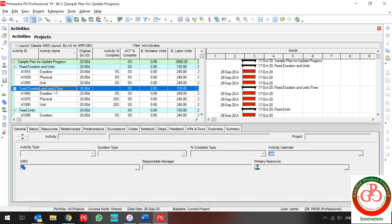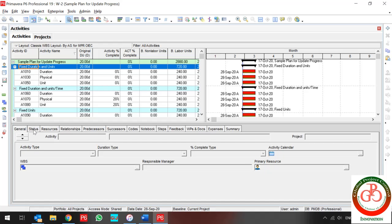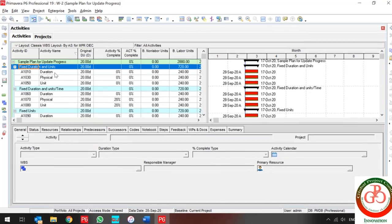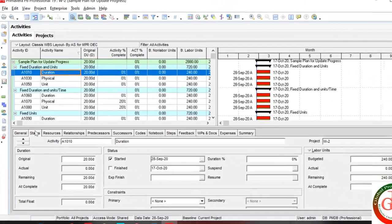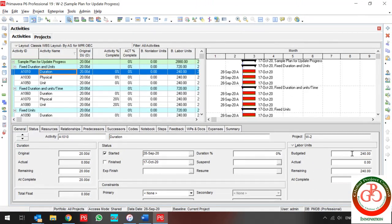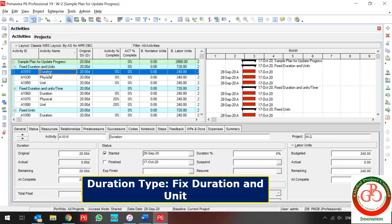Let me show you what happens to your activity for each percent complete type and duration type. These are the same activities with 20 days of original duration. Each activity has one labor resource, and I allocated 240 budgeted units to each resource. I want to update these activities to give you a better understanding of updating progress in Primavera P6.